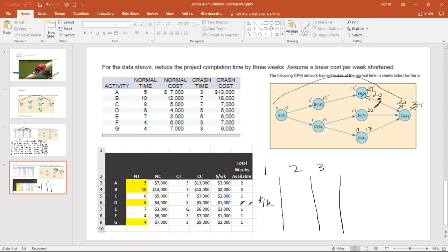It's gone now, okay? So if you think about what's going on here, if we reduce the critical paths at A or G, we'd only have to reduce one activity at a time. So right out of analysis here, we can say probably the next place to reduce time is A or G, because if you reduce one of these two activities, and this should go to 19, if you make this 19 now, you still have 20 here. This is still the long pole in the tent. It's still the limit. We'd have to bring both of these paths down to 19 by this point.